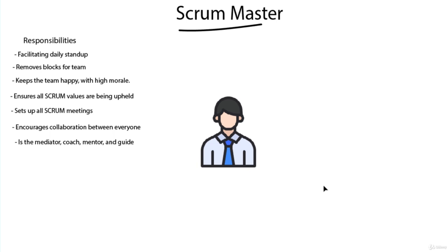A lot of organizations do not include a Scrum Master as a dedicated role. In a smaller business, this can work, and that's just because you might have a lead developer that acts as part-time Scrum Master, part-time lead developer, and maybe they'll work 20 hours doing the lead developer stuff, 20 hours doing the Scrum Master stuff. That'll work pretty nicely because that means they have the technical expertise to help and mentor their dev team, as well as the time needed to talk to the product owner and get things across.